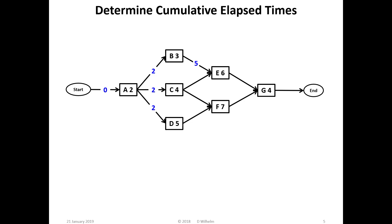Task C also starts after day two, takes four days, so is complete at the end of day six. And task D, also starting after day two, takes five days, so is complete at the end of day seven.